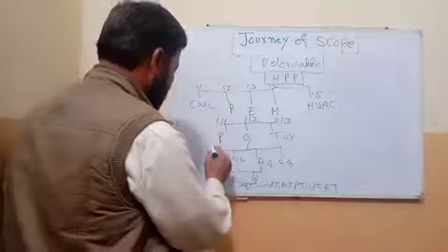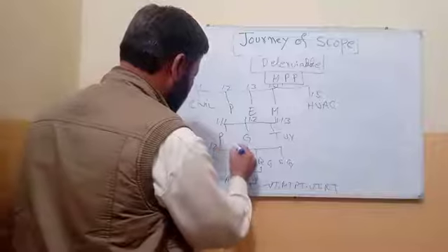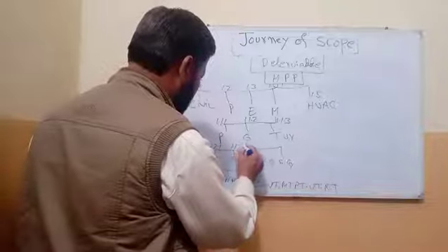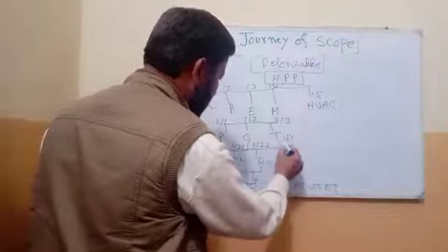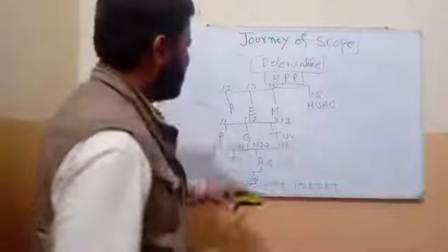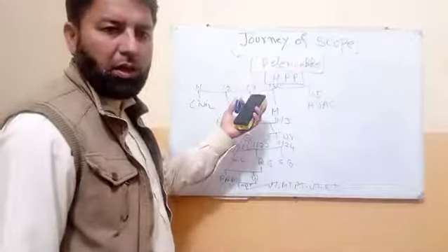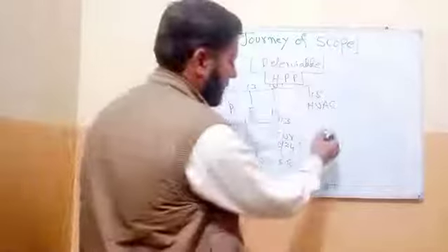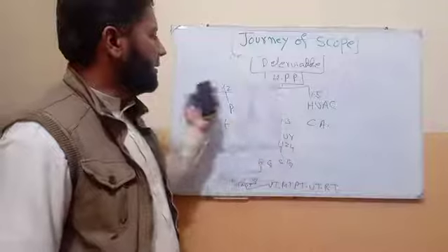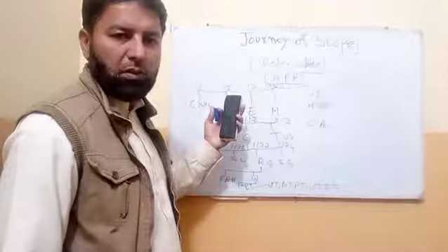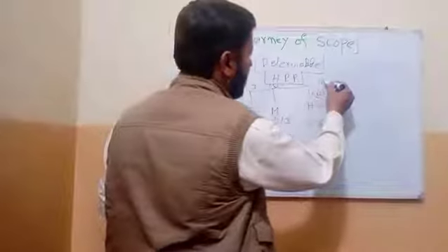This is further divided into 1.1.2.1, 1.1.2.2, 1.1.2.3, 1.1.2.4. These numbers 1.1, 1.2, 1.3 we call code of account. And this highest level is called management account. Some are called control account, some are called management account.